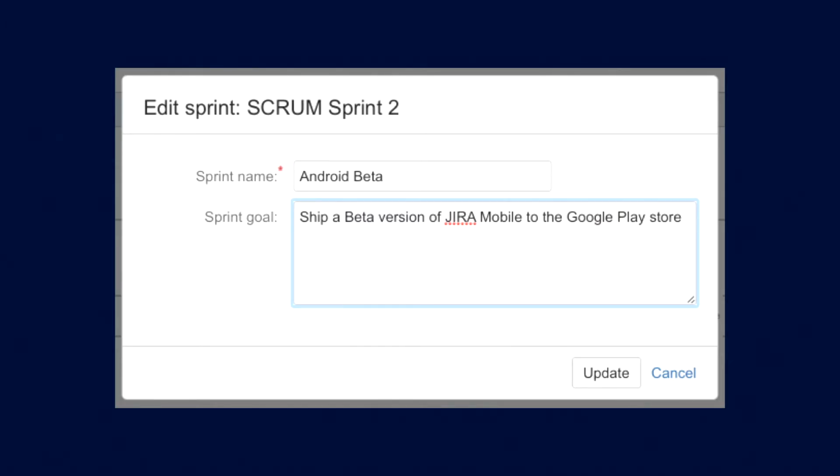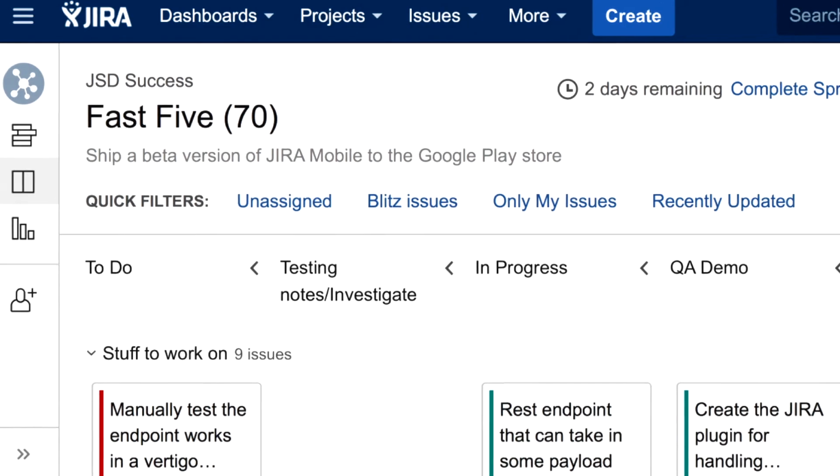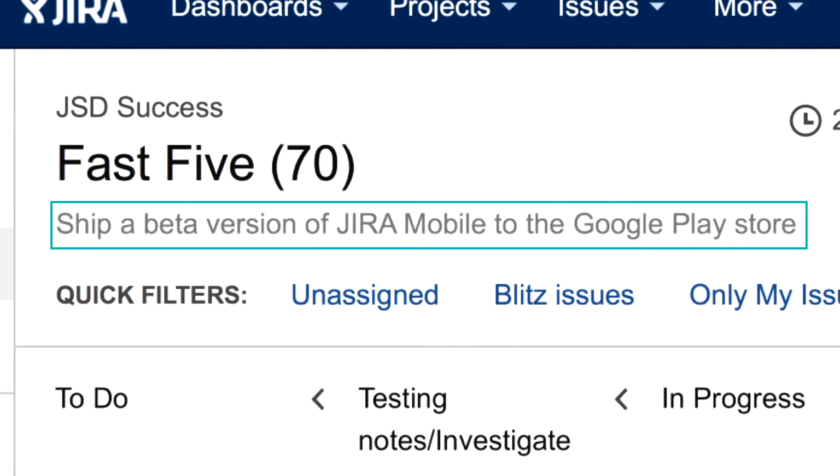So when you're setting a sprint goal, teams will go out of their way to ensure that they're not just set and forgotten. So they put them in their sprint, so you can actually do that on the board now, and they talk about them during stand-up every single day. The goal appears on the Scrum board, and they just won't get forgotten that way.